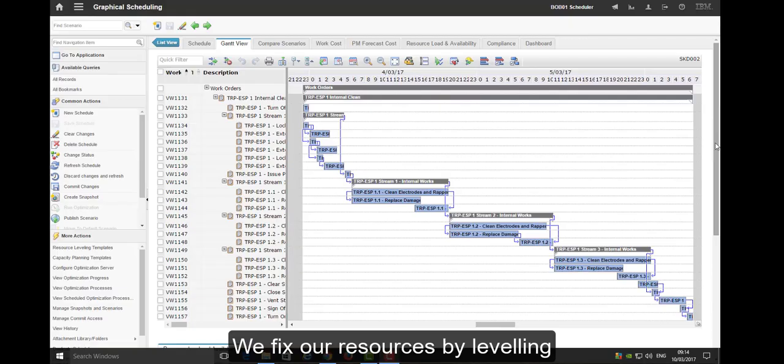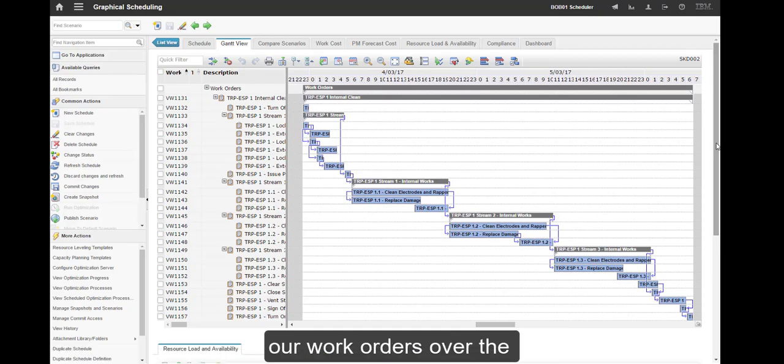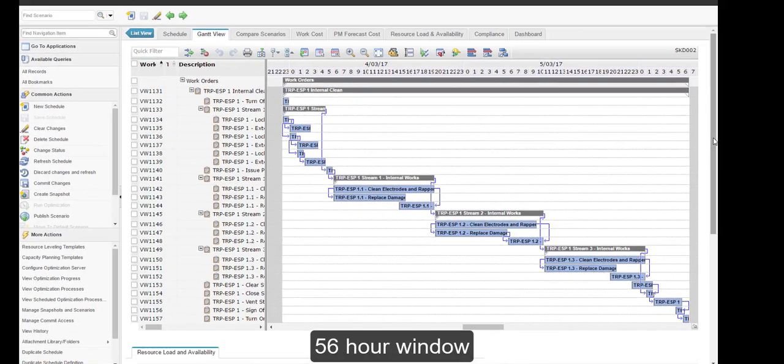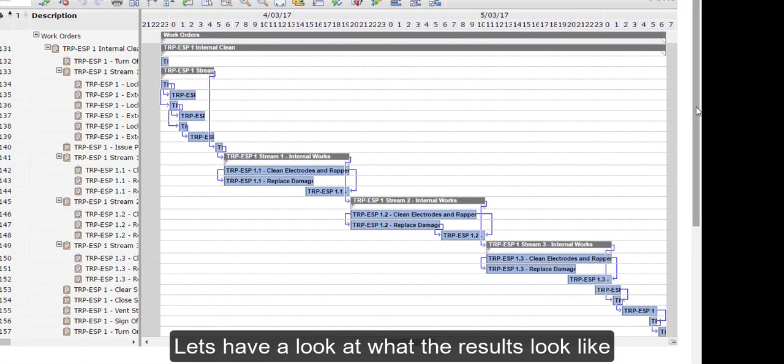We fix our resources by levelling our work orders over the 56-hour window. Let's have a look at what the results look like.